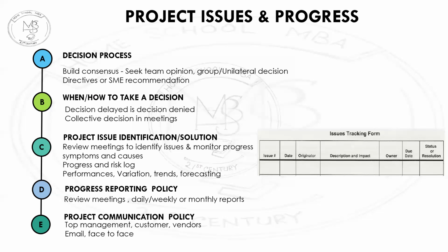And that is how you measure the performance. When you measure the performance, you measure it against the cost, against the time, and against various other specifications. Based upon that, you can forecast whether the project would be completed in time or not. If not, then you have to make some special efforts to make sure that the project is delivered in time. However, there are 10-15% buffers built in there, but within those buffers, the project must be completed.